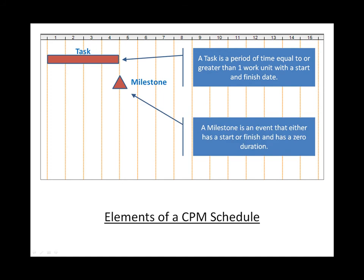Then there's the milestone. Milestones are typically used to flag an important event in your schedule. Being a zero duration event, a milestone will either have a start or finish, but not both.